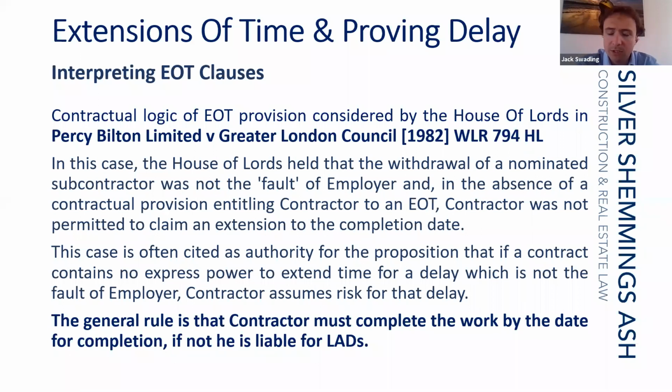So, given the importance of the extension of time provisions for the allocation of risk between the contractor and employer, or contractor and subcontractor, and the potential consequences of the extension of time provisions, listing what are the relevant matters under the contract, and failing to include actions by the employer that prevent the progress of the work, could put time at large.